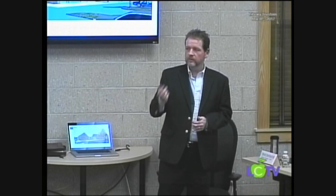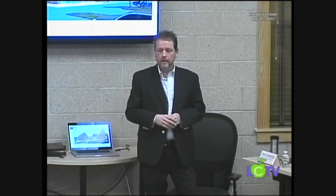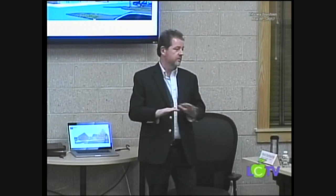And with both designs that you've come up with in this early stage of schematic design, is it the case that both can be LEED certified? Sure, yes. The question is about LEED certification. It's Leadership in Energy and Environmental Design. The Board of Library Commissioners has additional money available for libraries that achieve LEED certification, and the minimum is $100,000 to reach certification, or I think it's 3.5% of your grant amount. So if you calculate that out in your case, I think it comes out to about $115,000 to get certified. So you're actually a little bit over the minimum. If you wanted to go to silver, you'd get a little bit more money back. The number I gave you was based on certification.